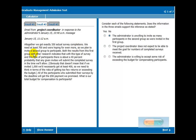We plan to invite a second group to participate. It looks like the first group was not enough. But the results from this first group indicate that for this type of survey and participants, there's about a 40% probability that any given invitee will actually complete the survey.